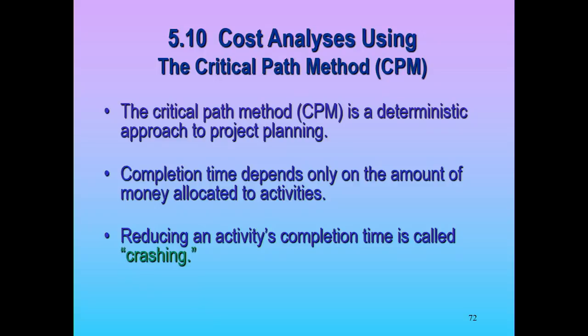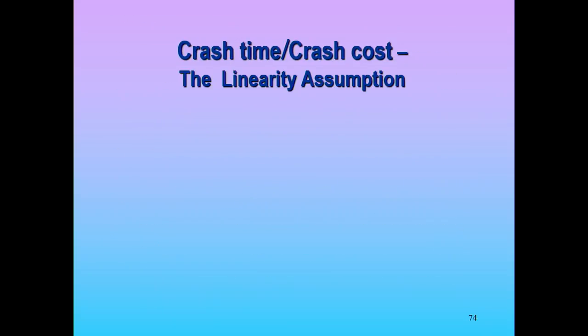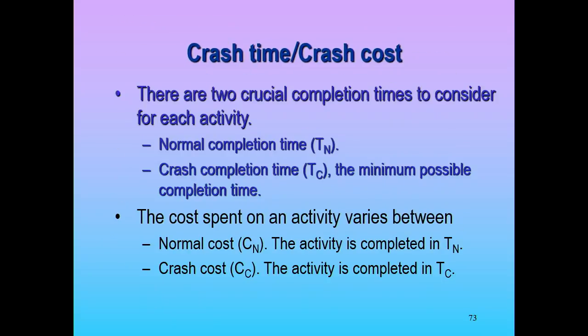Very good. Okay, so think about it. When we talked about it, we said that these slack activities have wiggle room, so why would we spend that money there? So the first place we look is the critical path. And not only that, we need to look at the marginal cost of reducing an activity. A day is a day no matter what activity you're talking about.